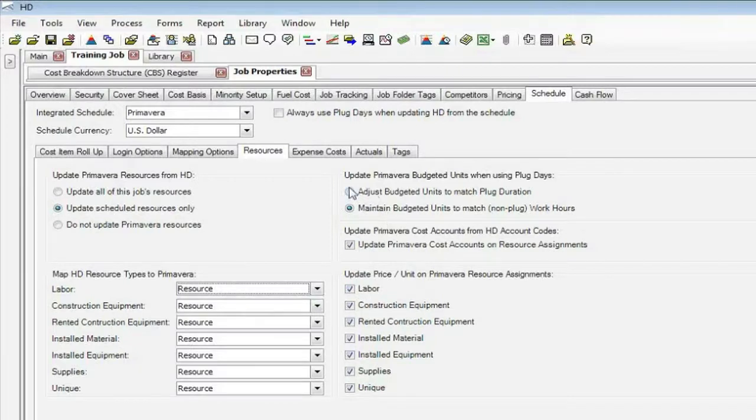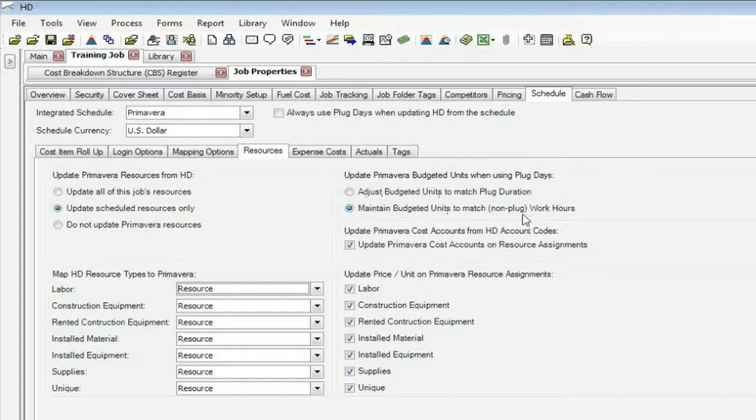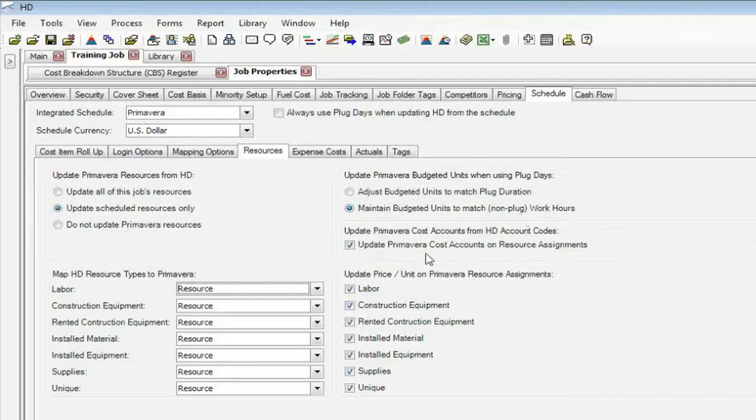This up here decides on how you want to come up with the budgeted unit cost for Hard Dollar, based on the plug duration, which you can change, or the actual duration, the work hours that come from the estimate. If you set up account codes in Hard Dollar, we'll send those out to the resources if you want.